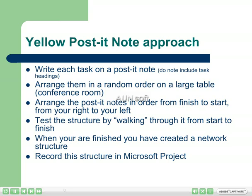When you have finished this, walk the project through from the starting task all the way through to the end. This will confirm that you have things in the right order. When you have completed this, you will have the information necessary to enter your network structure in Microsoft Project 2003.